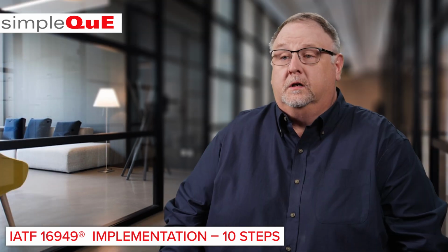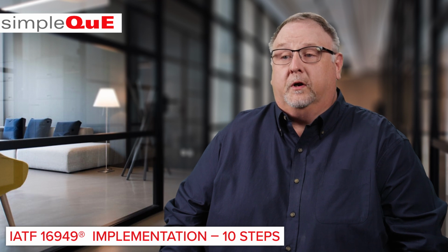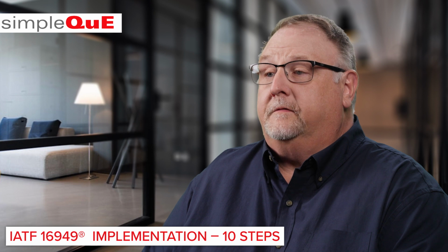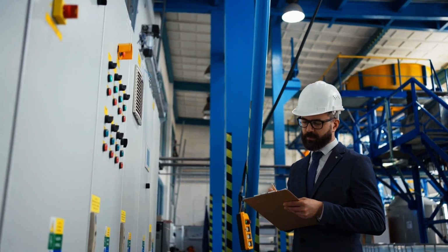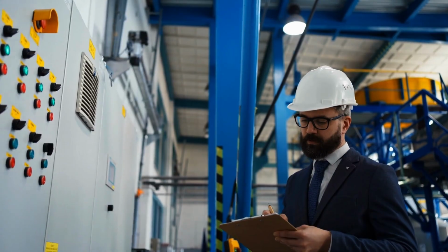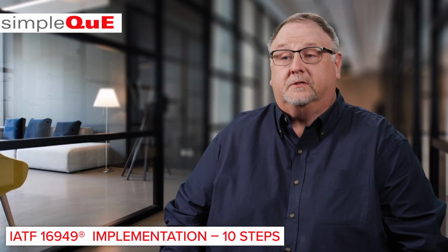Step 4, determine the gap in the current quality management system to the requirements of IATF 16949. Step 5, defining assignments to address the gaps as far as documentation, implementation, and effectiveness reviews, and this takes the most time. Step 6, training employees to the process changes.